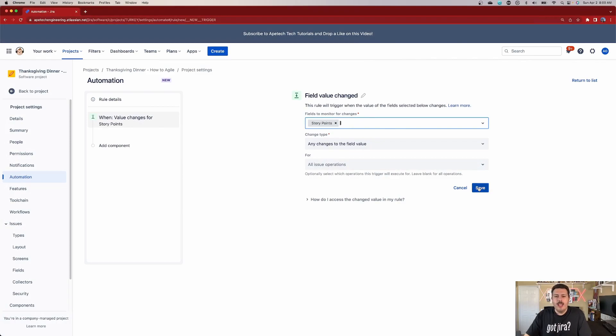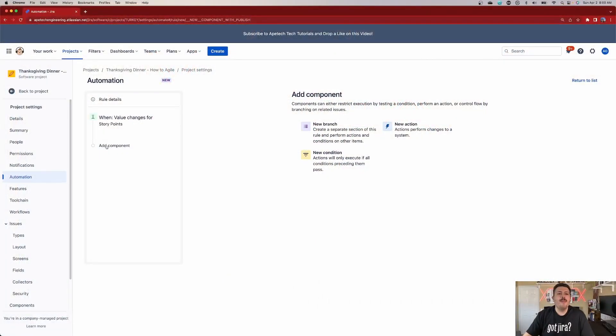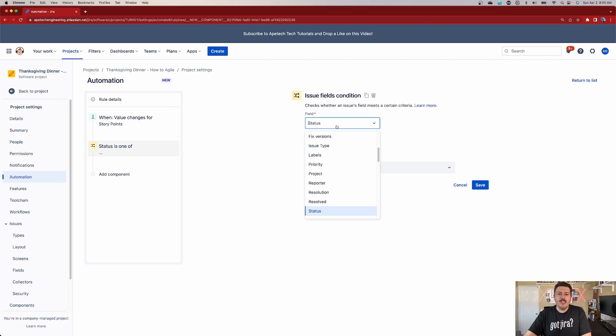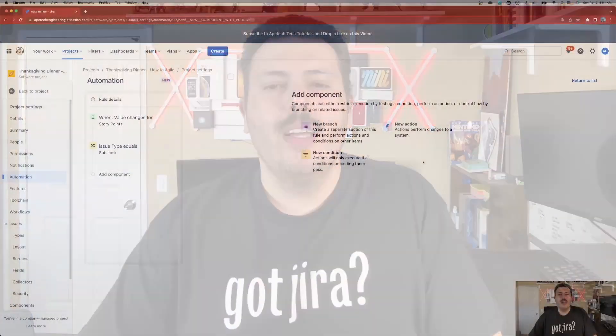Select story points and click save. Next, because we don't want this to trigger every time, we only care if the subtasks contain the story points. If the story contains the story points, we're already good — we don't need to do any roll-ups. But if the issue type happens to be a subtask, that's when we want to trigger. So we're going to add a condition — a fields condition — and we're going to look for issue type and check specifically if it equals subtask. We don't care about epics, stories, tasks, or bugs, only the subtask type.